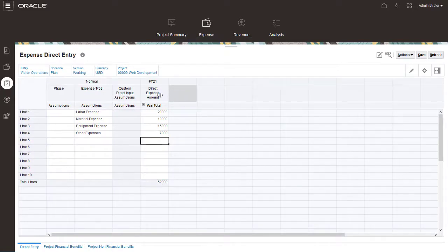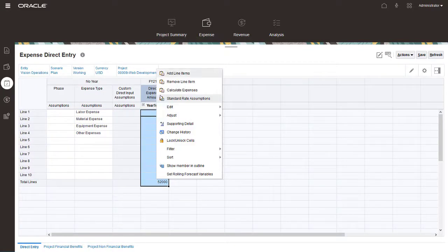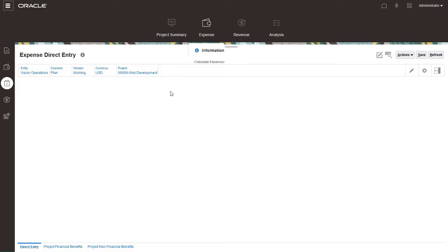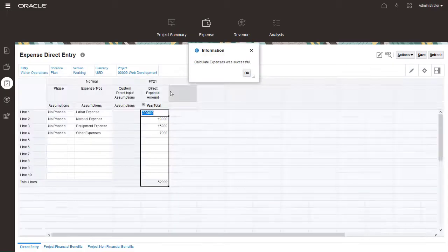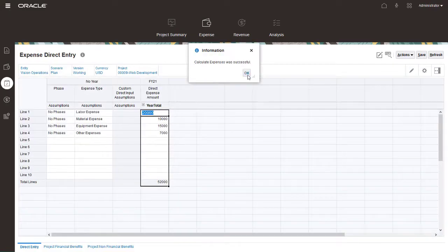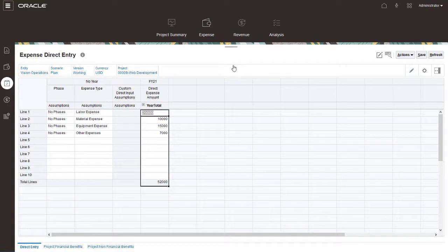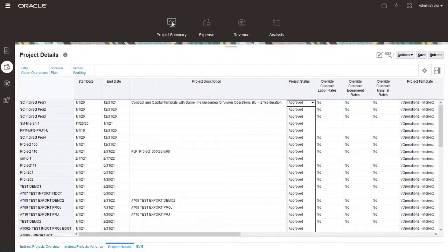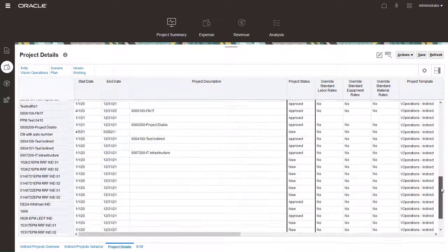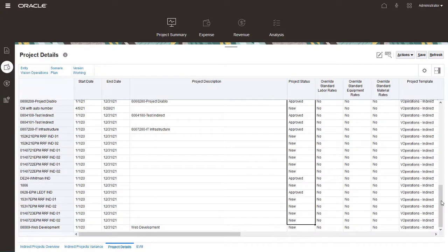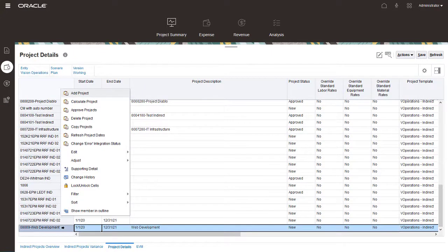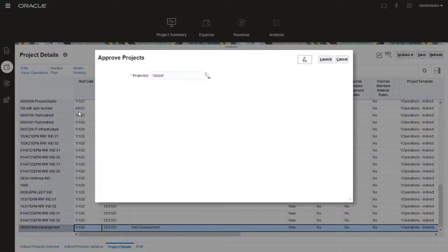Finally, right-click in the form and run the Calculate Expenses rule. After planning expenses, new projects must be approved in EPM Planning before you integrate them with Project Management. Return to the Project Details page, right-click the project, and select Approve Projects.